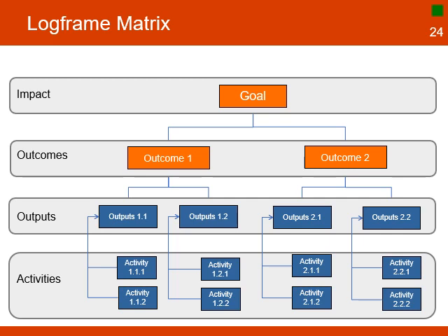The Logframe matrix is the basis for the development of the project plan, and that will include the schedule and budget for all activities. It is important to remember that the Logframe is not a rigid tool, but one that should be adapted to the changes in the context. As the project makes progress, changes will happen. The monitoring data will provide information to identify the causes of the problem and develop corrective actions on time. Assumptions change, new risks occur, and the project manager should regularly review the Logframe to make the required changes, especially in the levels of activities and outputs.